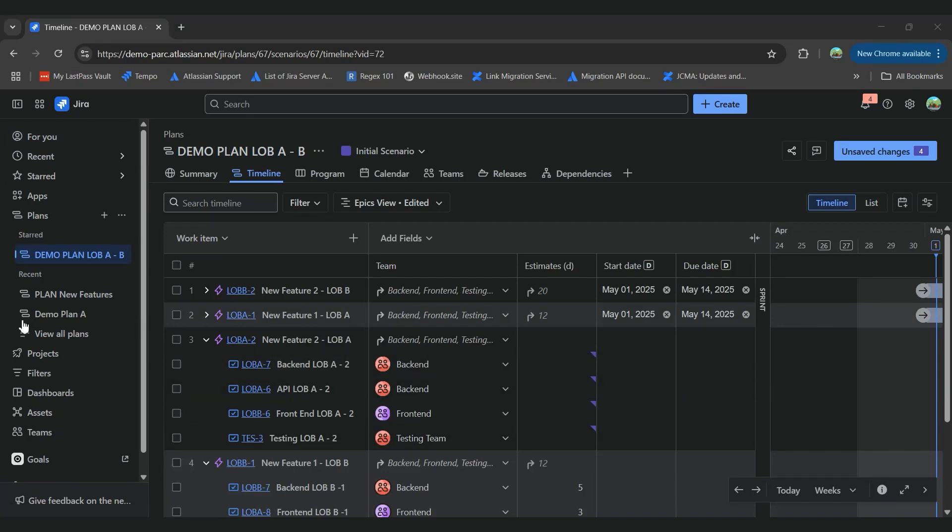So this feature will construct a plan using work item details, which you can then adjust to meet your exact needs. It balances a range of different values, such as the dates assigned to the work item, the work item estimates, the team's capacity and any dependencies between the work items.